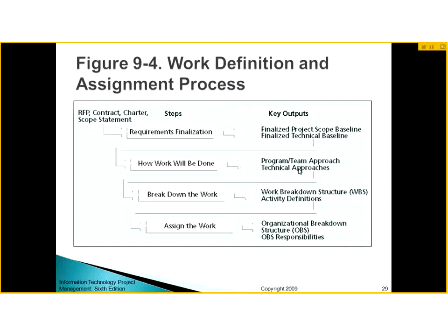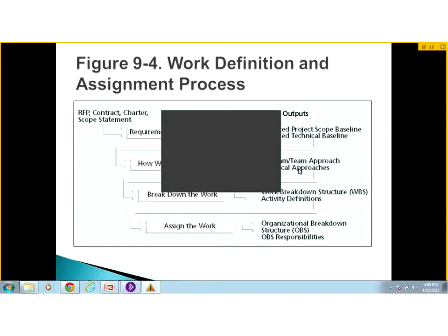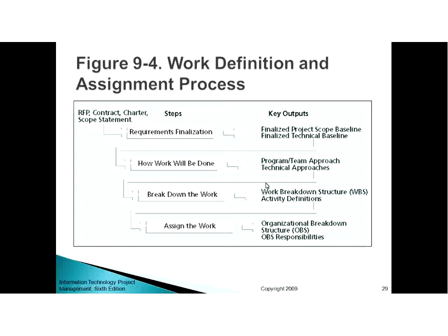And to assign the work, what you do is that against the WBS, you make an OBS, which is organization breakdown structure, like who will be responsible from the organization for each of the WBS items.